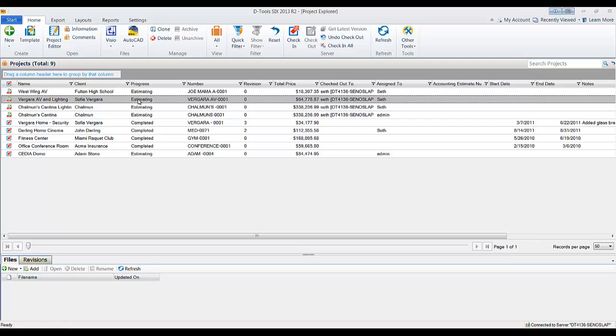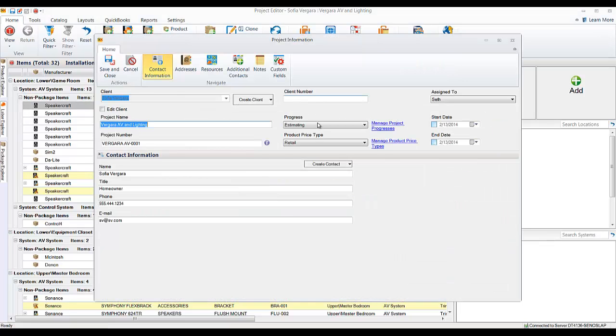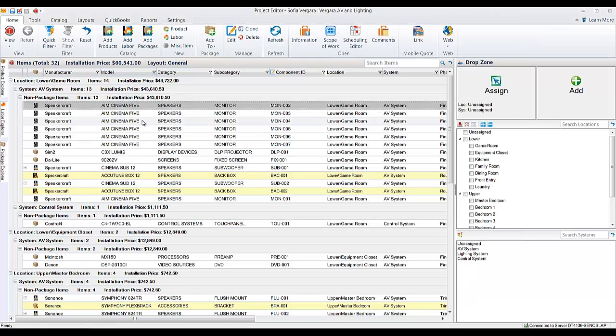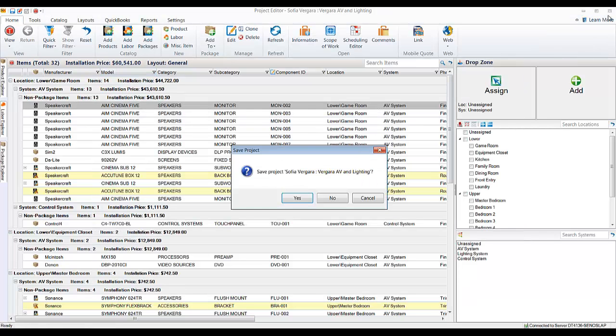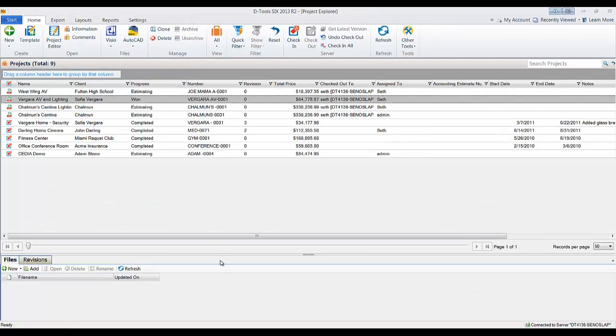So what I have to do first is push over an estimate. I'm going to give you guys a scenario of how you could do this. If you're estimating on a job, you've presented the client the job. Again, this is just a little sample one I built here, and they approve it. Good practice here, not required, but you might want to mark that you won the job. Save and close the project file, and create a revision. So you're going to lock down your as sold.